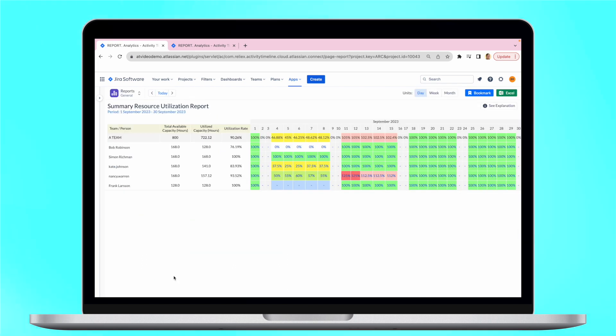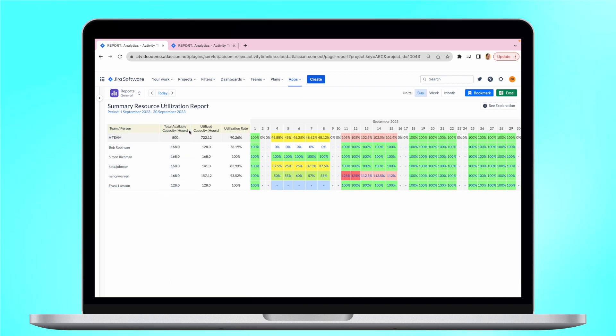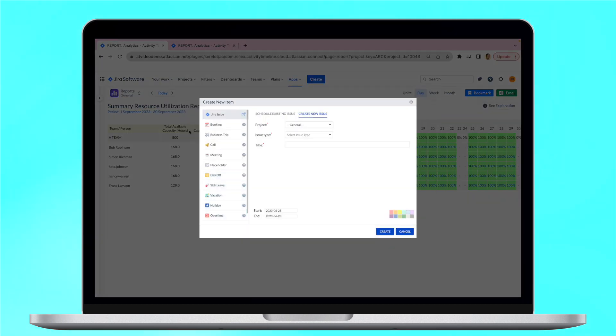Here we can see a combined workload of the team and users for a month, their total available capacity, which is based on the user's working hours, but also takes into consideration all the holidays, vacations, and other non-working days.